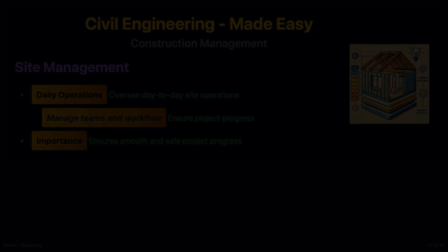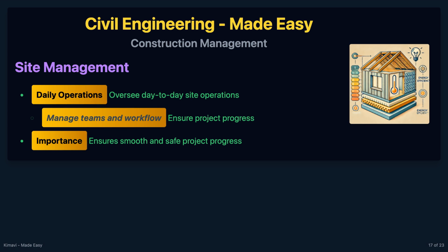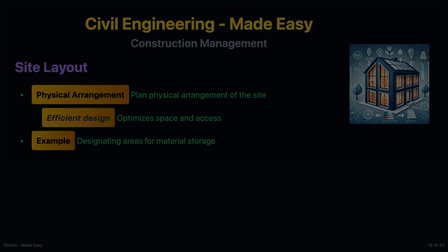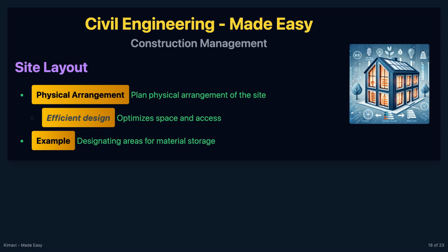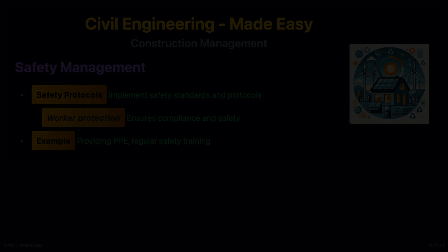them up. Site management involves overseeing the day-to-day operations on the construction site to ensure the project progresses smoothly and safely. Site layout involves planning the physical arrangement of the construction site, including storage areas, worker facilities, and access routes. For example, designating specific areas for material storage to minimize movement and improve efficiency.